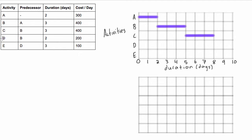Activity D depends on activity B and it's two days long, so we find the end of activity B, come down here and put it in there for two days.